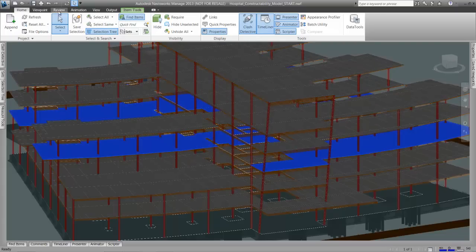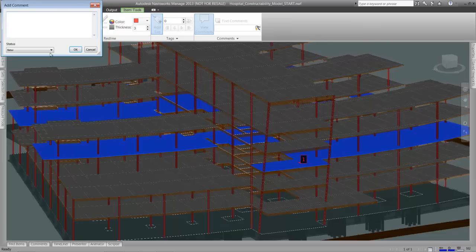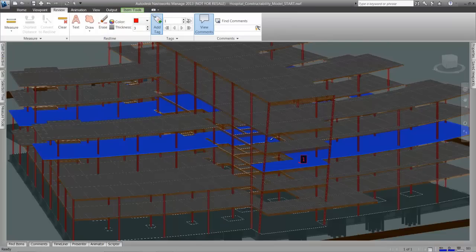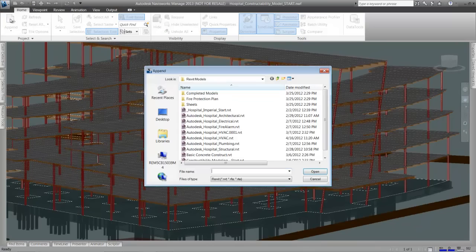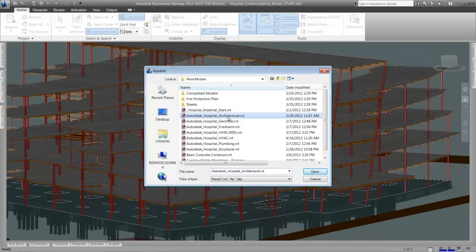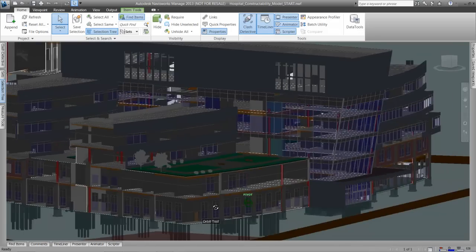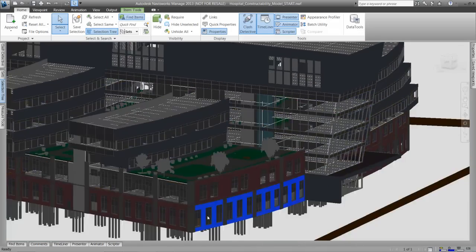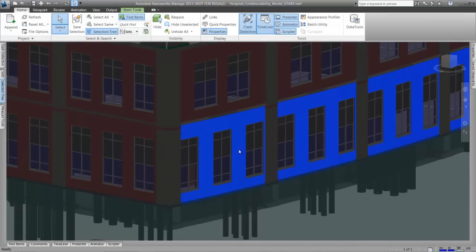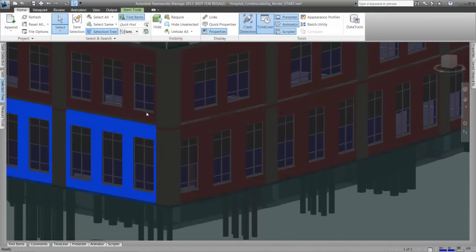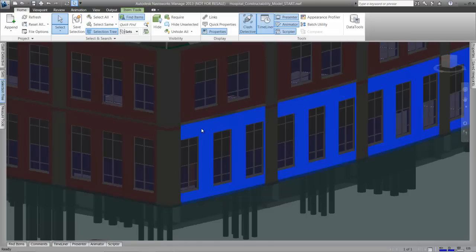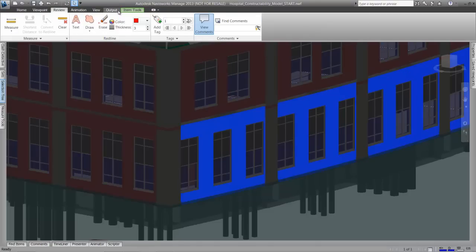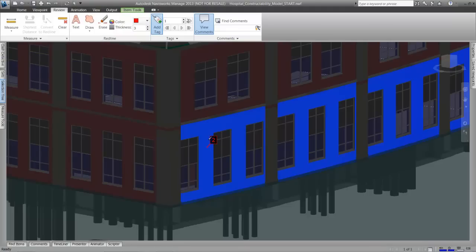This is really the role that constructability plays. We can see here that the design model specifically needs to be broken down to account for concrete pours in the slabs, as well as breaking down the walls so they can be sequenced and coordinated appropriately. Traditional coordination and quantification techniques tend to be extremely manual, which can be time consuming and prone to error. And project scheduling is traditionally performed in software that has no connection to the design beyond what is being manually entered by the planner.